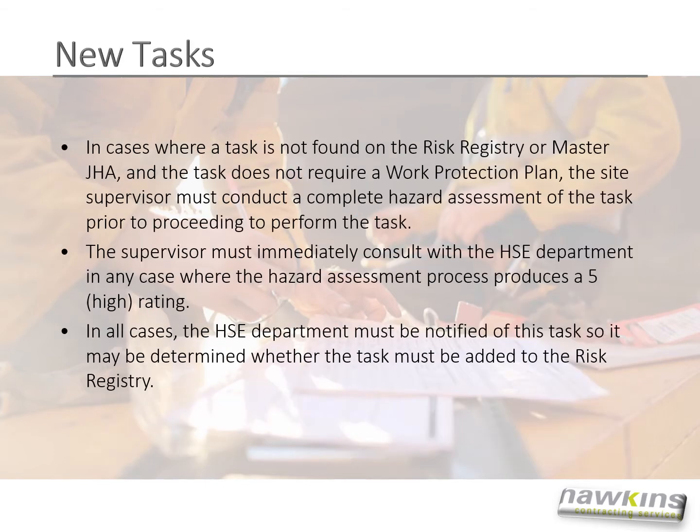Every once in a while, a new task will find its way onto your site, a task that you haven't yet assessed for hazards or risks. In cases where a task is not found on the risk registry or master JHA, and the task does not require a work protection plan, the site supervisor must conduct a complete hazard assessment of the task prior to proceeding